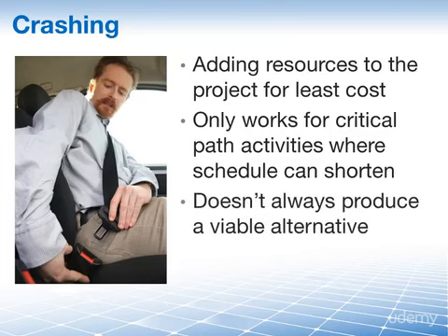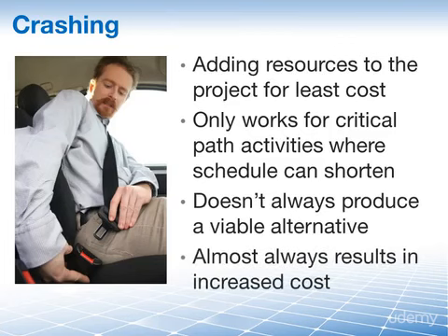Crashing does not always produce a viable alternative and almost always results in increased cost. Examples of crashing include approving overtime, bringing in additional resources, and paying to expedite delivery of activities on the critical path.